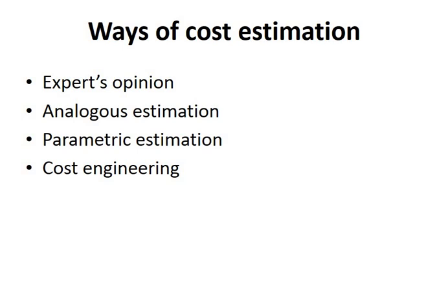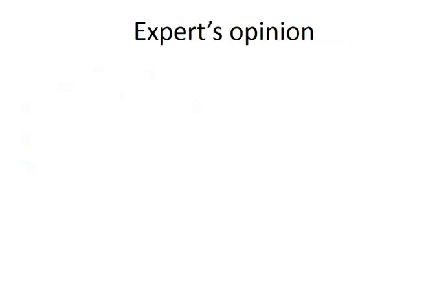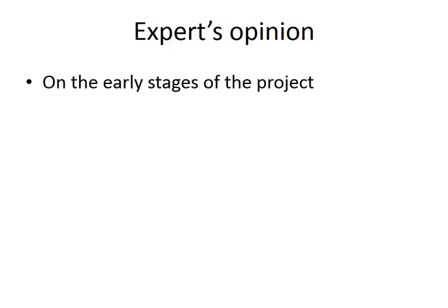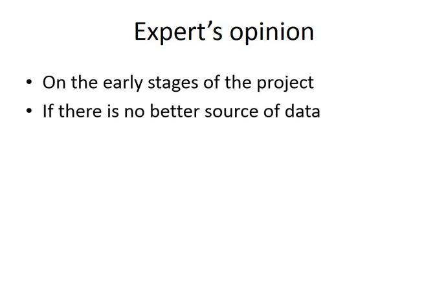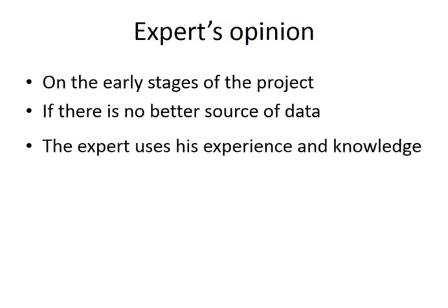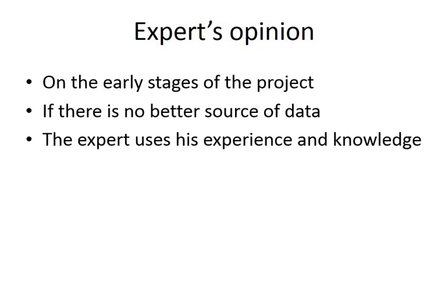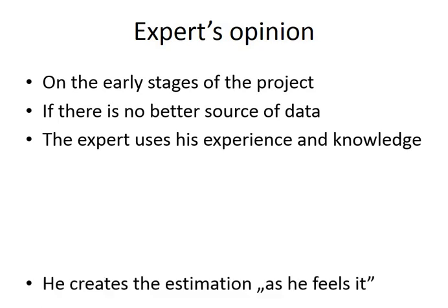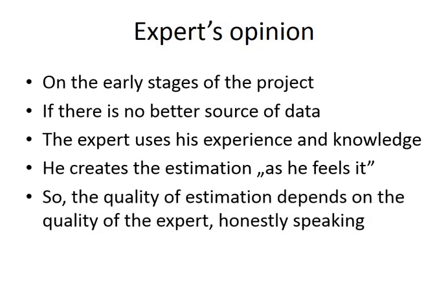So moving forward, we can think about the ways we can estimate the cost of our project. These are going to be some techniques showing how to make it. So the first way is to ask somebody that knows a lot about your area of activity, about your future project. So this expert uses his or her experience and knowledge to create the cost estimation.